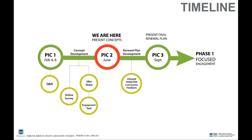For example, if a basketball court and the spray pad were part of phase one, we would start looking at that in greater detail and have a smaller engagement session, then start working on detailed design with anticipation of doing construction in the spring of 2022. That same cycle will happen for phase two and phase three. But for now we're really focused on the concept and want to make sure that what we bring forward as a renewal plan works for the community.